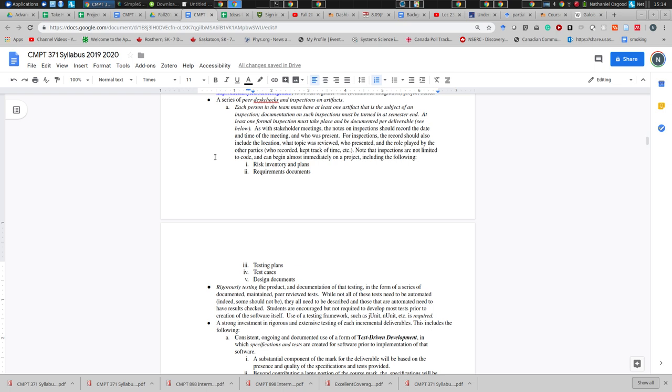And I'd like to see things documented. So there's a lot of things about what I want to see documented. Test matrices and tools that document traceability, the links between certain tests and certain requirements. I want to see requirements written down. Lots of things. Please go through them very carefully. This is not fluff. This is core needs. And if these are not met, we'll be asking at the time of the first deliverable, where's the list of requirements? And it won't be an excuse to say you didn't read them. So please go through these things carefully, bullet by bullet with your team, okay?